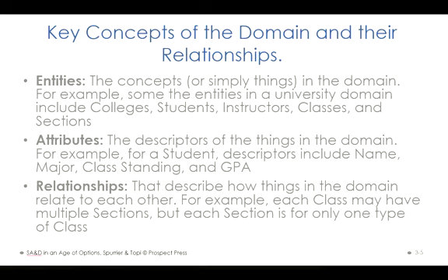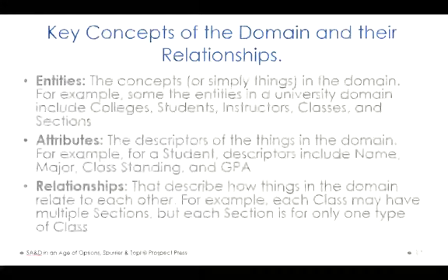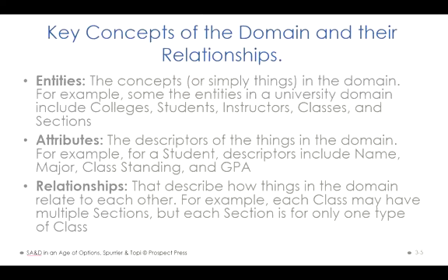Another interpretation of the term domain can be viewed as the boundary of the problem that we are trying to solve. In technology development, there is a special problem in most organizations. It's called requirement creeping. Requirement creeping means that whenever you have a system you want to build or implement in an organization, it is tempting to add more and more features into this particular system or software. When you add more and more features and functions into a particular software application, the project will never end.